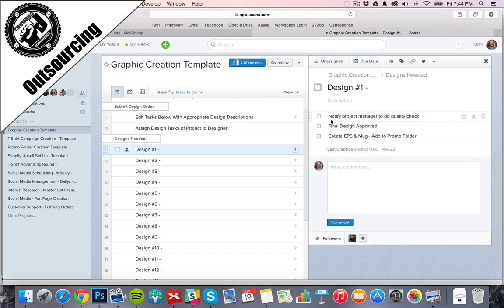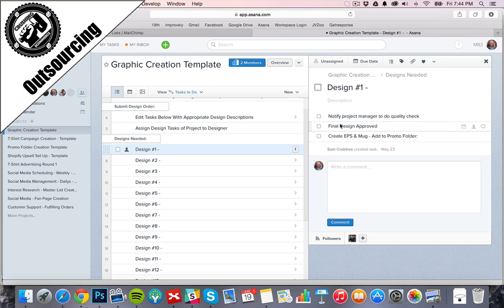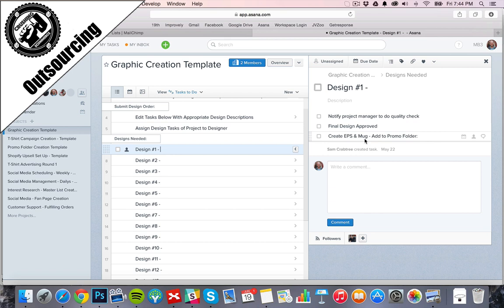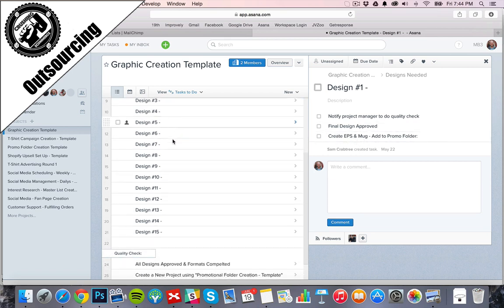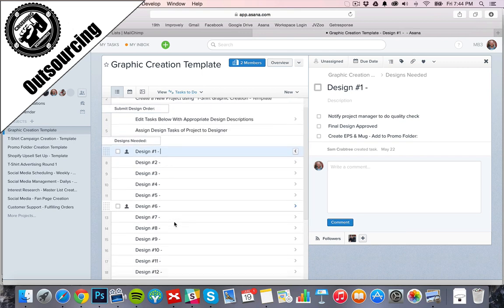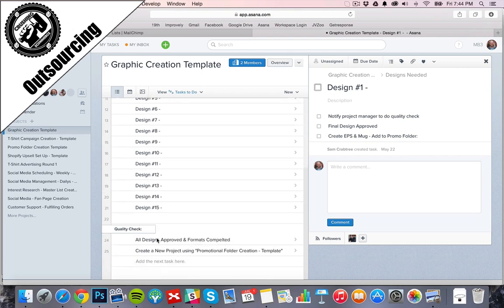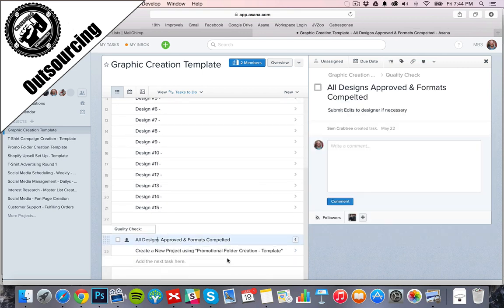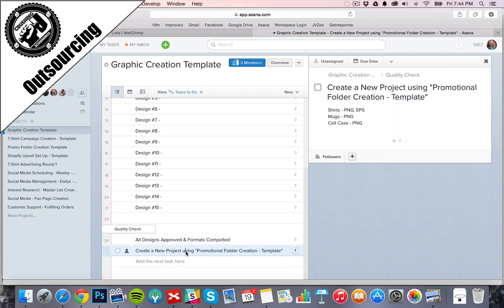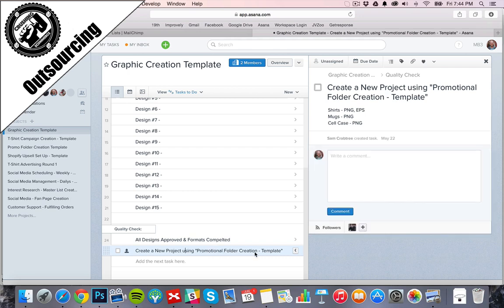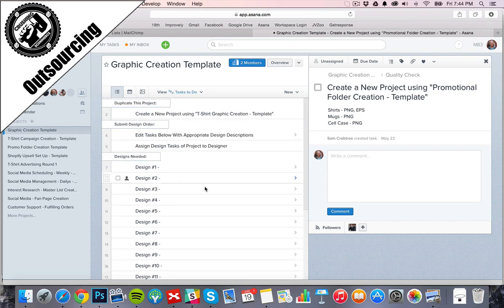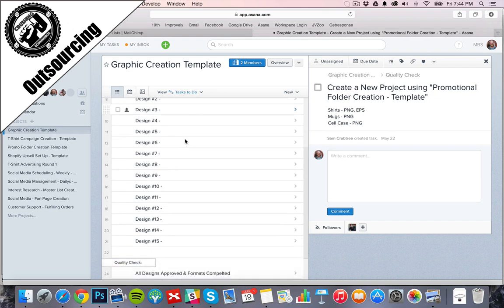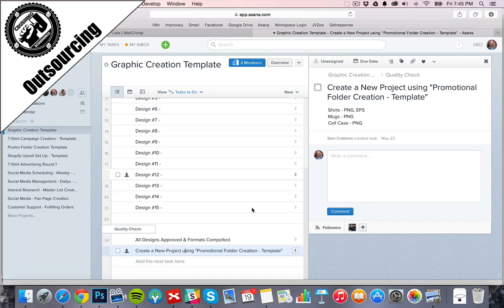As you can see here we have steps that the graphic designer has to checkmark as they go through this. They notify the project manager when the first draft is done for the quality check. Project manager will checkmark this one off for final design approved and then our graphic designer takes that design he created and he creates an EPS version for screen printing and he also creates a mug version for our coffee mugs. So that is the step by step process that goes down. We have 15 to 25 designs go a week. He comes through at the end, all are done, and then it moves on, it passes the buck, passes the flame onto the next step of the process. So this is the graphic designer and project manager in this step by step process.